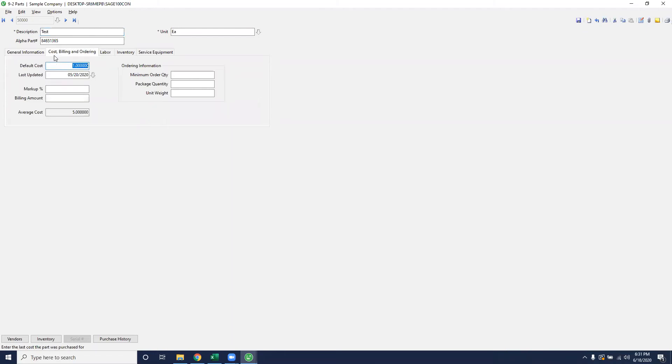The next tab is cost, billing, and ordering. This is where you will put in the default cost for that part. Remember, anything that is considered a part is something that just needs to have a monetary value tied to it when making your bid. That can be a labor item, an equipment cost, or truly the cost of material for the bid. The only reason that you would put in this default cost is so whenever you select this part on your takeoff, it will pre-populate the default cost. So all you would need to do is update the amount of the quantity that you need for the total bid.